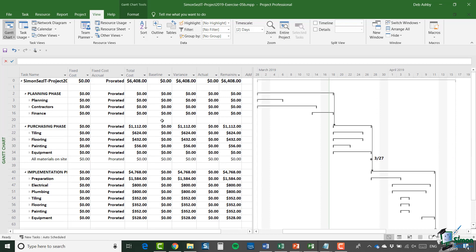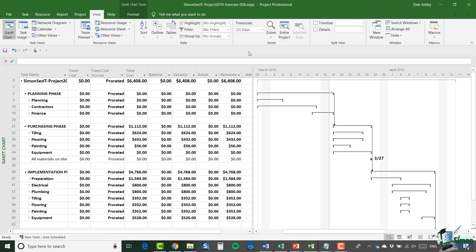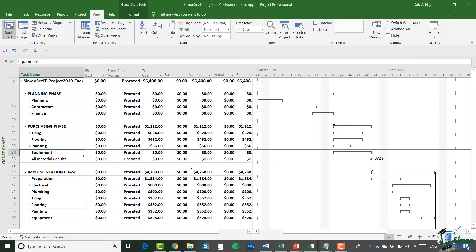Going to level two, you can see a very detailed tabular breakdown of cost, and you can drill right down to check the cost at any level of subtask. We still have the third type of resource to look at, and that is a cost resource. I want to refer back to what I said about how Project, when you assign a material to a task, by default assumes that you're going to consume that material uniformly during the task — and that may or may not be important in a particular project.